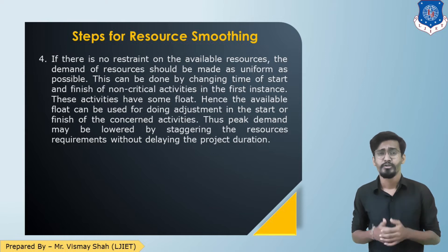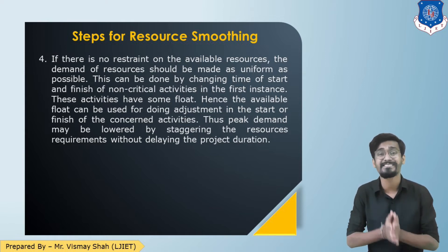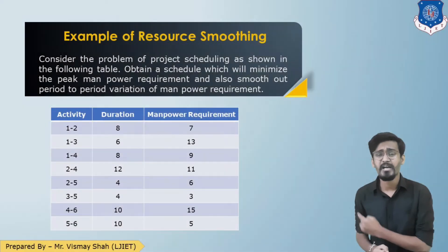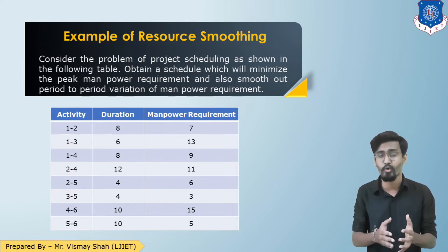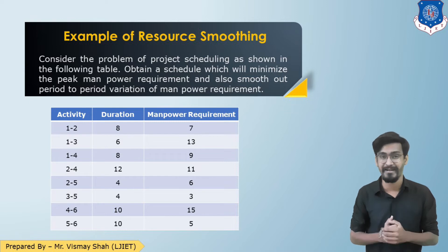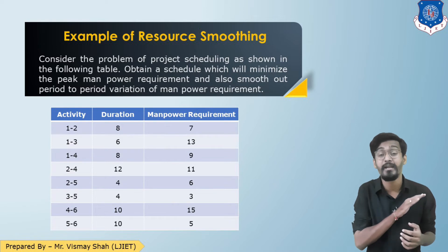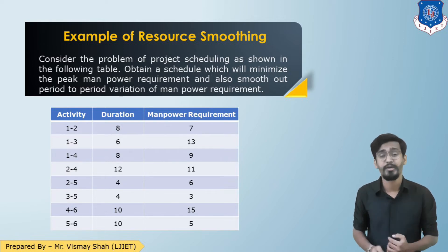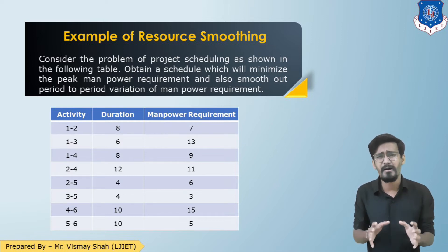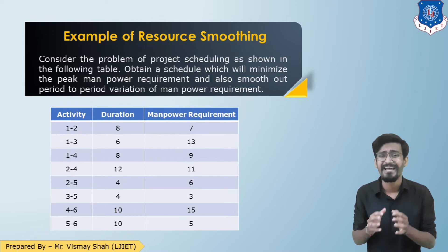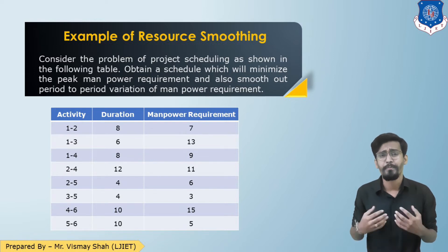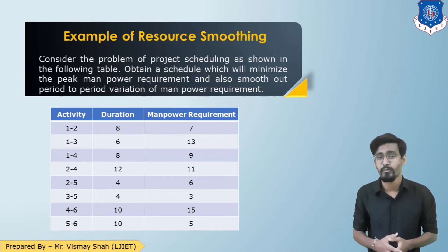Now let us understand a numerical for resource smoothing. A table is given for a construction project having activity duration and manpower requirements. We need to prepare a project schedule that will minimize the peak requirements and smooth out the resources. We need to determine the total resources each activity requires and also determine the float. To prepare the float, the very first step is to draw the network.